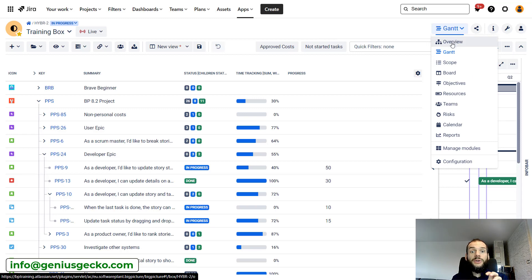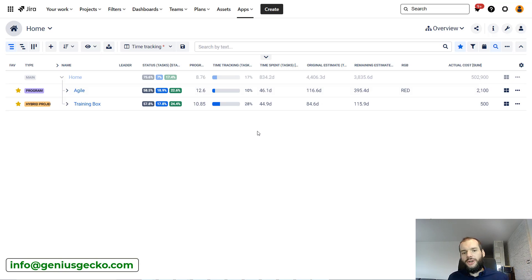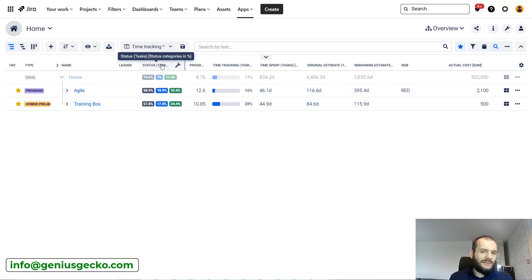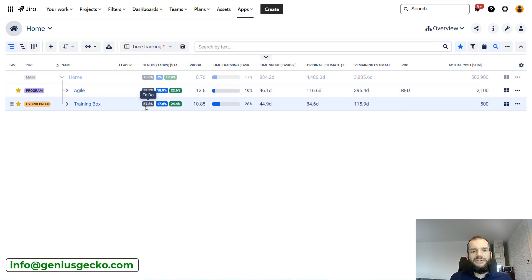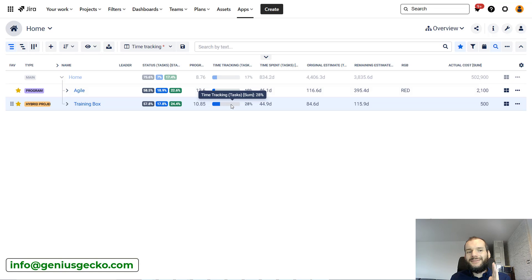Now let's quickly switch to the overview and talk about tracking progress at the whole box level. This is done essentially the same way as at the task level with some exceptions. We can look at the statuses of tasks inside the box — for example, nearly 58 in status category 'to do,' nearly 18 in progress, 24 done. This gives some indication of progress — not very granular or precise, but very often sufficient and it requires no additional work. Time tracking progress remains my favorite if you are already estimating and logging time, as it is the most precise option with basically no downside when those two criteria are met.